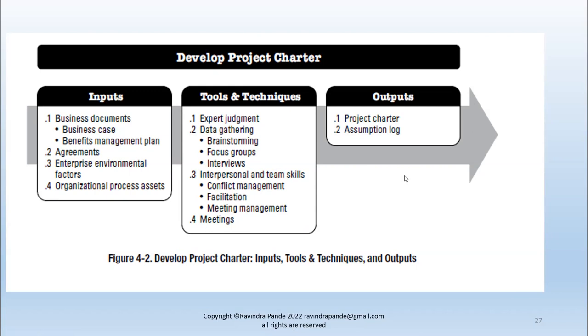So when COVID struck, the top management guided the project managers to use the resources remotely, because of the contagiousness, the state legality change, the federal legality change and everything. So we started working remotely. Now, this is a kind of enterprise environmental factor, normally referred to as EEF, that affected our project, and project efficiency went down, because we had to understand how to work remotely. We had to start using a different tool set.